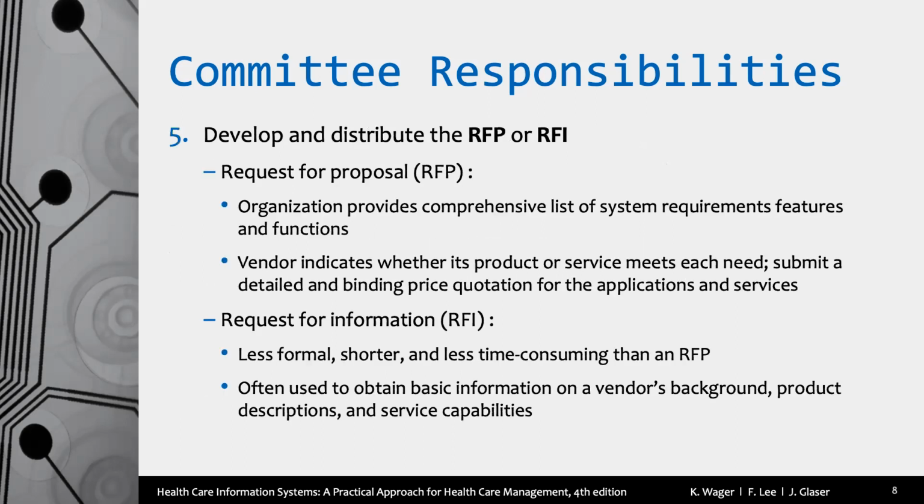So once you get to that point, you want to develop an RFP or an RFI. So request for proposal or request for information. And I'll tell you, in this industry, more often than not, it's request for proposal. And the reason why is, if you see here how the text defines these two, this is accurate. An RFI is shorter, it's less formal. It just doesn't include as much. And a drawback to it not including as much and being less formal is it's usually not as legally binding should you encounter an issue.